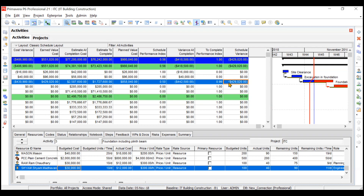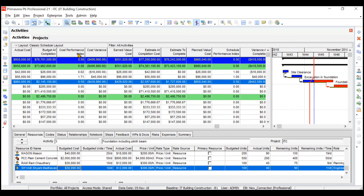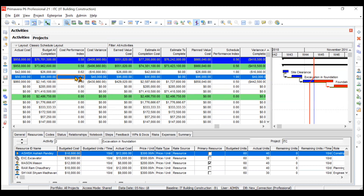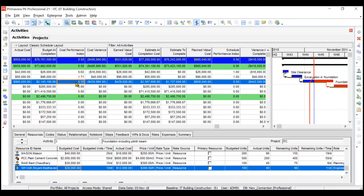Cost Performance Index (CPI) and Schedule Performance Index (SPI) are ratio versions of the variances. CPI is calculated as EV divided by AC, whereas Cost Variance is EV minus AC. CPI values are 0.62, 1.71, and 0.50 for the three activities respectively. Activity one at 0.62 is over budget, activity two at 1.71 has cost under control, and activity three at 0.50 is overrun.